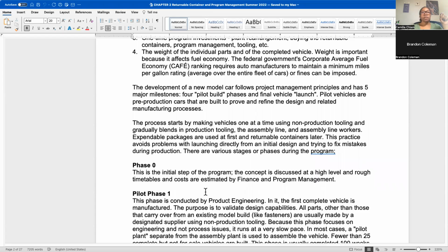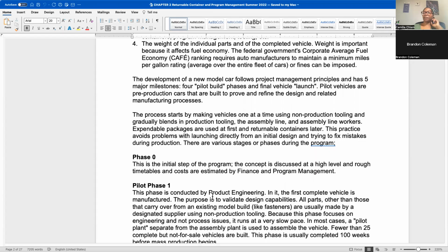So sometimes you get a department that needs conveyor equipment and they don't quite have enough money because they underestimate it. So they will take the money from the pool of packaging because it hasn't been used yet, because it's not time to buy packaging. So just be aware of those things. And then by the time it is time to buy packaging, you might be short and you may not have enough money to buy all the packaging that you need. And that's a whole different issue right there. We won't even talk about it right now, but we will talk about that later.